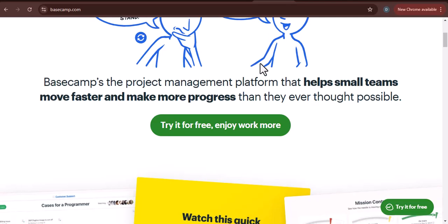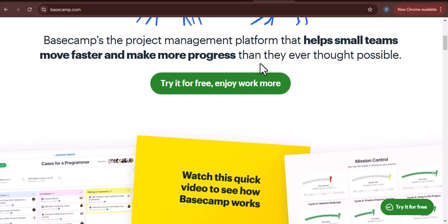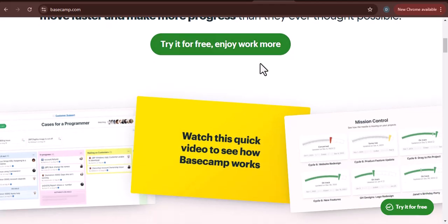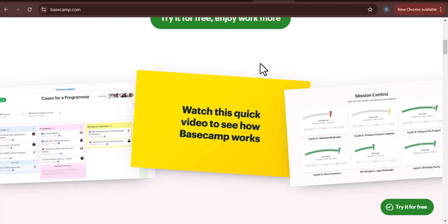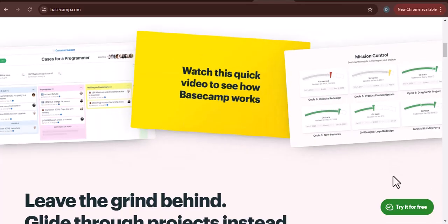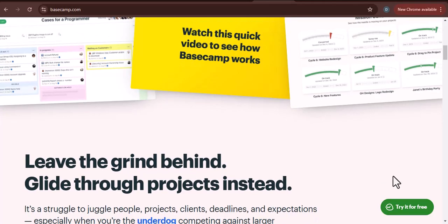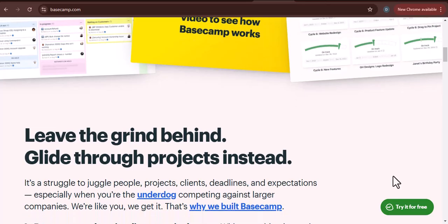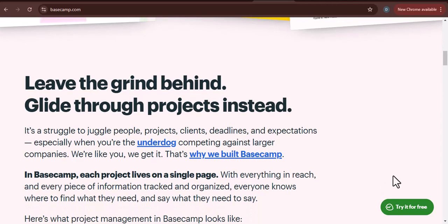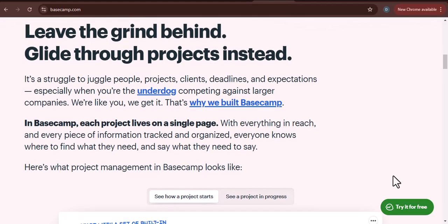How it works. When someone submits your form, Zapier acts as the bridge. It can automatically take the submitted data and create a new to-do in a specific Basecamp project, post a message on a message board, or even add a comment to an existing discussion. For example, a new client inquiry form submission could automatically create a new client onboarding to-do list in Basecamp, populate the to-do descriptions with the client's information, and assign it to your sales team. This streamlines workflows and ensures no lead or request falls through the cracks. Benefits. This approach gives you the full power of a dedicated form builder, customization, logic, validation, analytics, while still leveraging Basecamp for project management and communication.